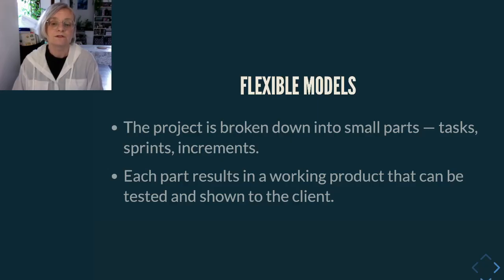Flexible model works the same way. In each small cycle, the team goes through all small stages: analysis, design, coding, testing, delivery. Each cycle gives a working result and a chance to adjust. This way, you avoid disasters and keep moving forward faster and safely.